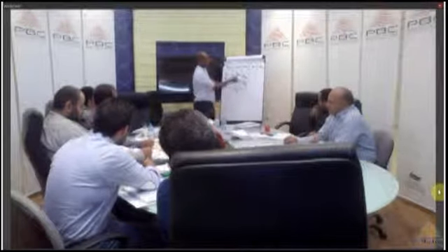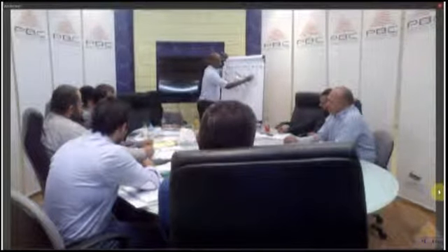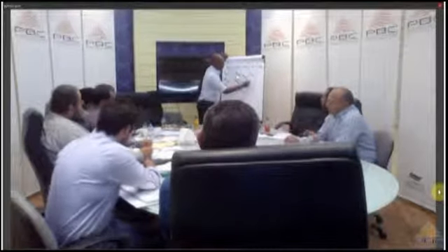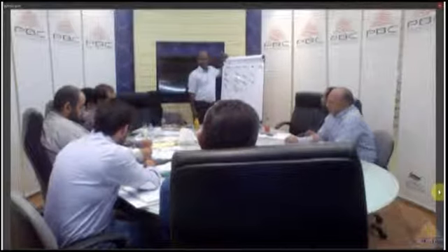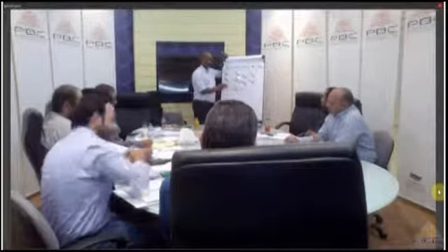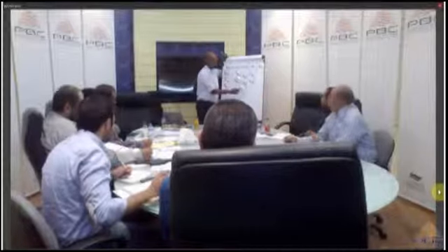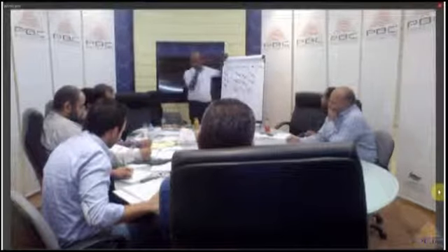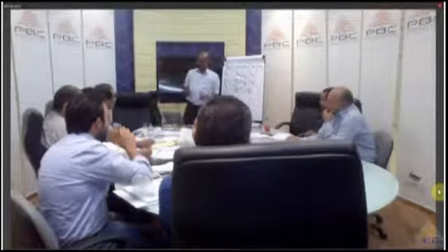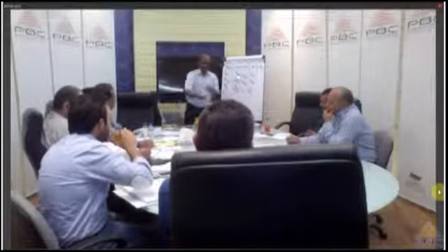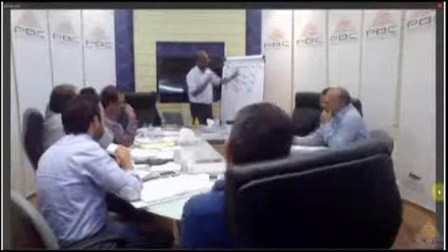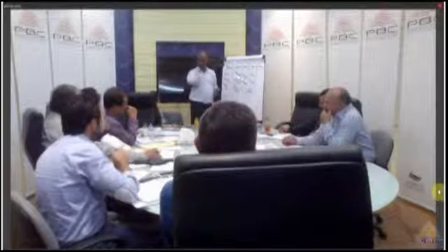So we will send the client a progress report daily via email. We will send the sponsor a financial report weekly, a written report. We will let the media know about success stories of our project bi-monthly through a press conference. So we will rent a nice place in a hotel, invite the media, give them some presents, and give them the presentation about our project. So this is called the medium, وسيلة الاتصال.